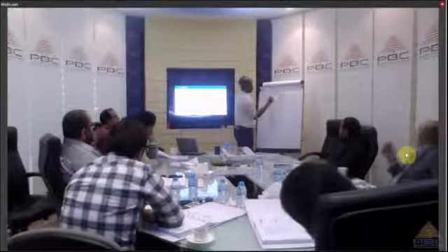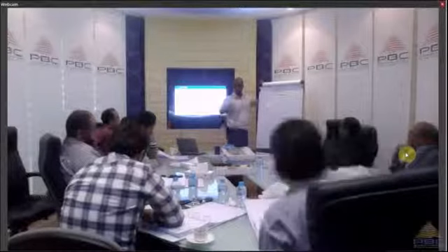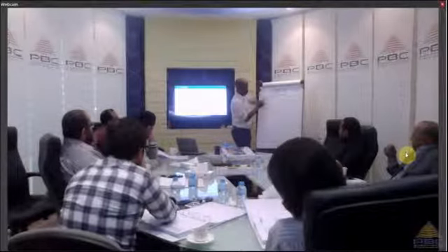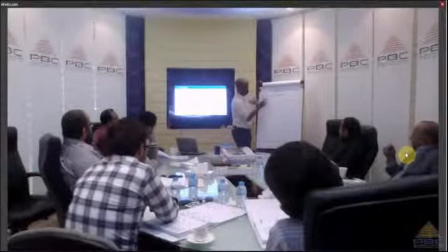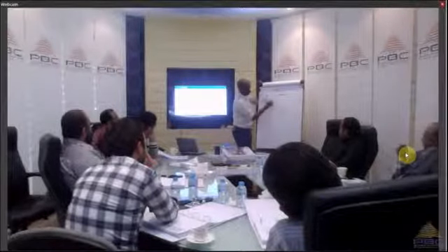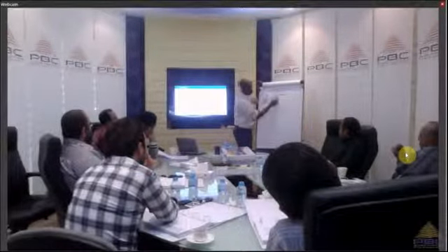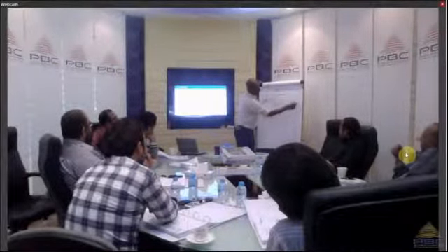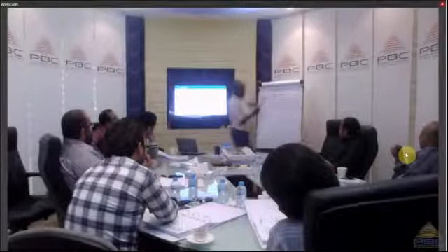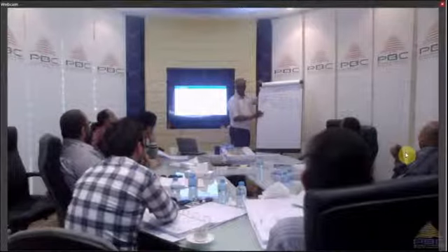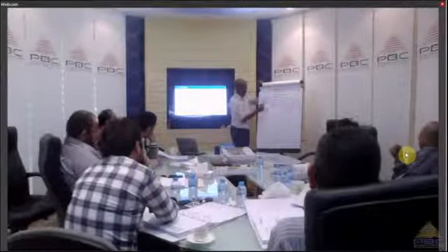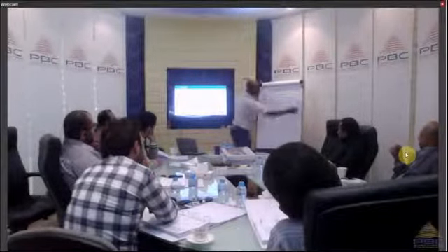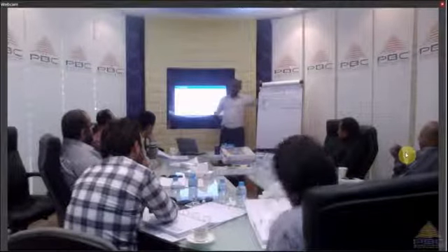Okay, so Oracle Financials, IT, to automate all the finance work in PVC. The first thing is I collect requirements, then I design, then I develop the software, then test, then implement. So these become my five phases of project work. To collect requirements I do this and this, to design I do this and so on. So this is called creating the WBS using phases.